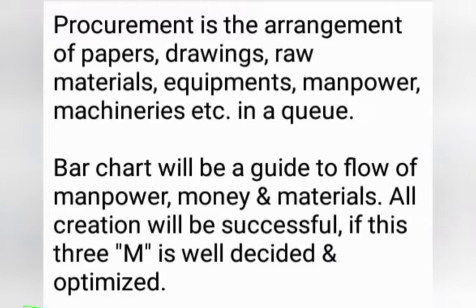Market survey, availability of material, testing and approval of material are to be done before procurement. At many places, fine aggregate supply is hampered in the rainy season. Somewhere there is a shortage of stacking yard. Breakdown of machineries also hampers a project. So proper procurement is vast management and responsibility. It is an important stage, as the value or cost of the project highly depends on it.